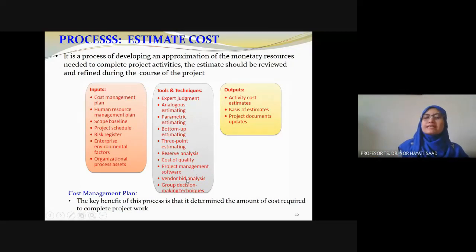Vendor bid analysis is very important as well. If we put low, we underestimate, we may get the project, but the risk will be on the contractor. But if we put too high, we overestimate, it will also cause risk to the contractor or vendors, because you may lose the project.